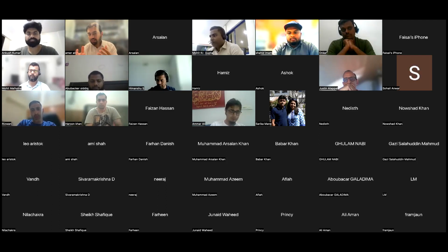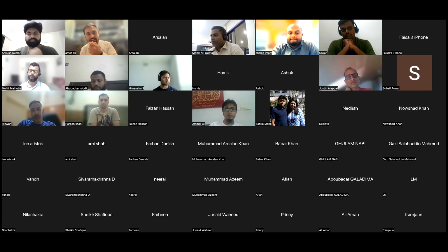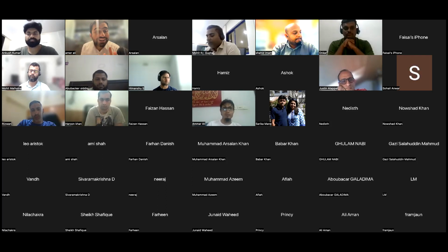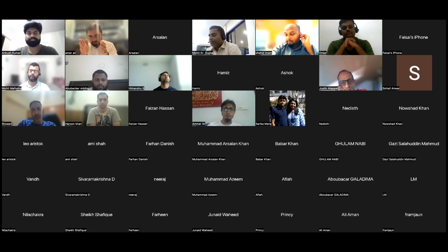No, procurement, risk, quality, it all happens in execution also. Now in execution, what are we doing here? In procurement, we are having a bidder conference. In risk, we are implementing the risk response. In quality, we are doing quality assurance, audit, right? We can talk about each knowledge area, scope, schedule, cost, what happens in each one if you want to talk. If anyone has any confusion, I'm here.